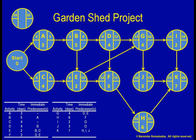Having worked forwards through the network diagram to get the early start and early finish dates, we need to work backwards to get the late finish and late start dates. Looking at Activity K, the latest we must finish it without delaying the project is Day 28, and for that we must start at the latest on Day 21. Since K must start by Day 21 at the latest, J must finish by Day 21 at the latest. Likewise, I must finish by Day 21 at the latest and start by Day 19 at the latest. H must finish by Day 21 at the latest and start by Day 15 at the latest, and so on, until we have entered all the late finish and late start numbers.